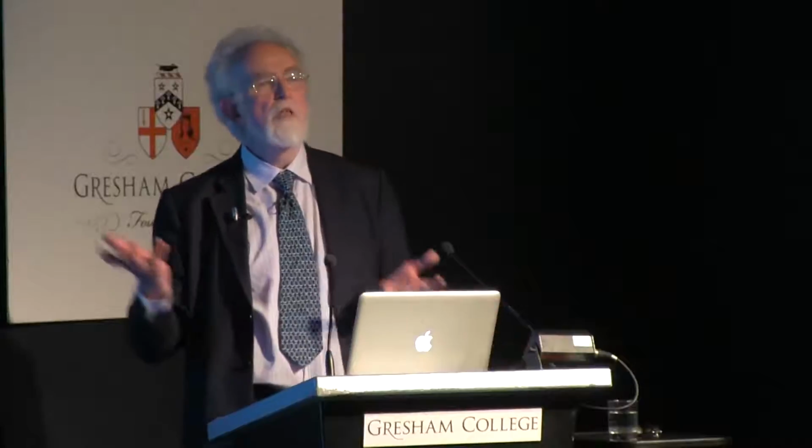And that means that you need to take responsibility for the training environments, for simulators, for making sure that the training works and that it's refreshed if the underlying business processes change in a subtle way, perhaps because of a package upgrade. So you have to take planning responsibility and management responsibility for the much larger system. It's not just about building an IT system. And when people try to do that, it almost always goes wrong.